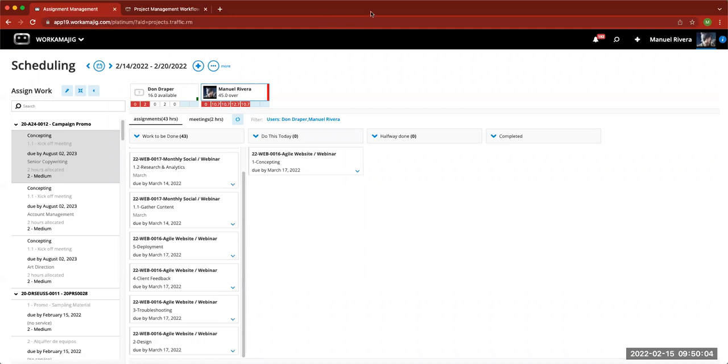At this time, it looks like I may have a question. Giovanni says, when logging time to a task, does the percentage completed change according to the time entries? The pain point we have is that the time is logged, but the team is not setting the percentage complete. So the time is technically independent of the percentage complete. However, it does affect the project percentage complete, because what it's doing is weighing the time entries versus the time that it's spanning for the task to be completed, as I remember it correctly.